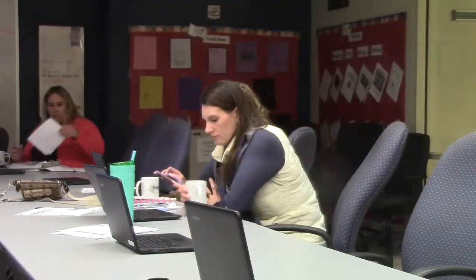And then, just out of curiosity, I won't be able to come to your bid meeting on the 8th, although I wanted to. Do they get any type of information or paperwork at those meetings about the projects? So that would be review of all the specs, so they're going to get those big binders and all the drawings, all the contractors that come to participate. And that's their opportunity to say, I don't understand this, or this doesn't make sense, so that we can give them better clarity, so they all bid on the exact same thing. Okay, at the pre-bid, yeah.